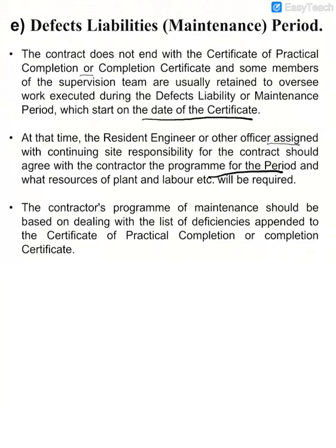When they issue the certificate of practical completion, they will list down the deficiencies or defects that the contractor needs to rectify during DLP. So during this DLP period, the contractor has to deal with and solve all the deficiencies.